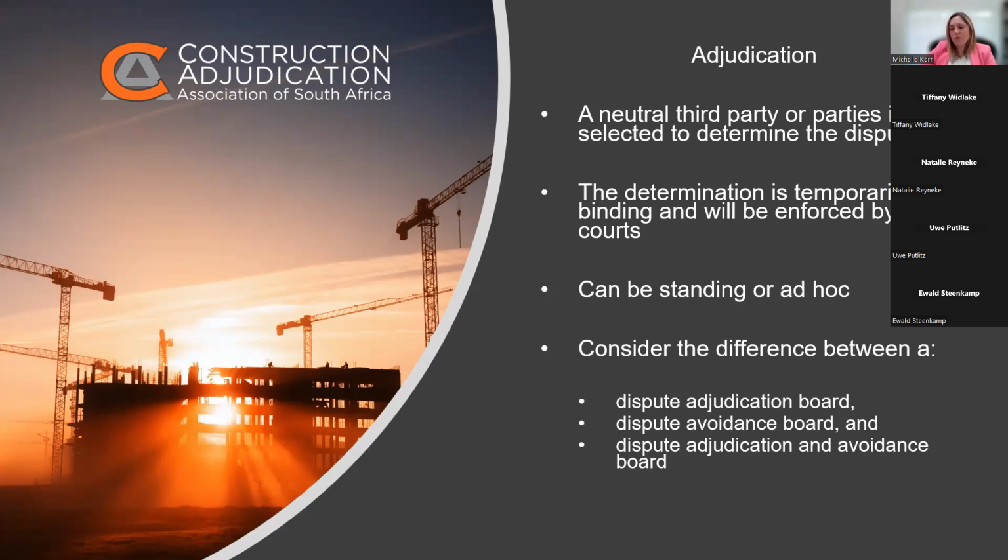So there should be, in the provisions on how the standing board can operate, a provision that says, look, we've got the standing adjudication board. We'd like to be able to ask their opinion on something or bounce something off them. And the provisions of how your adjudication procedure governs that process should ideally allow the parties to do that and him to come back with some sort of opinion, even if it is not a full-blown dispute that he's making a binding decision on.